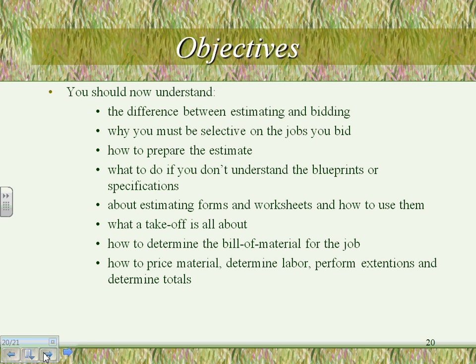Moving on to page 55, my friends. If you look at the little table on page 55, they took the 1/2 inch EMT with the number 12, and they have 645 feet of it. And they add 10% to the wire. We will talk about this one, guys, in the coming sessions. I'm going to go all the way to page 57.